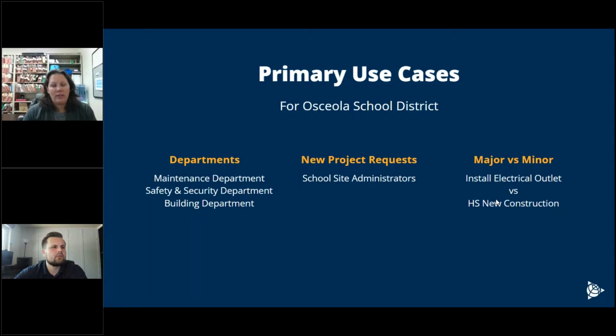Once they've reviewed and approved it, it goes to the next person. At the end, when the change order is finally approved and the forms review process closes, it will spawn a change order tracking process. That process just has all the information of the change order that nobody else is in. It's basically taking the change order information and creating a log. So that process they're not in.